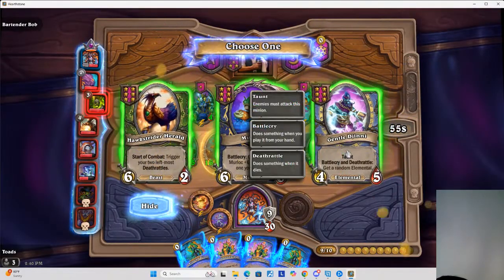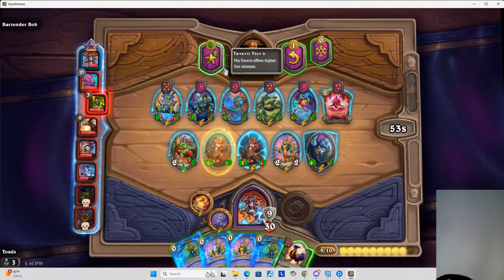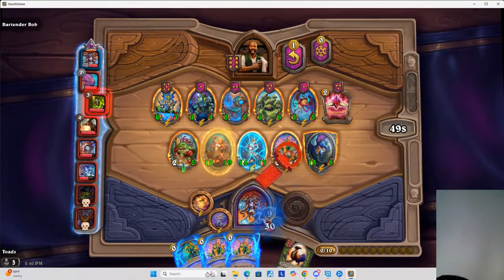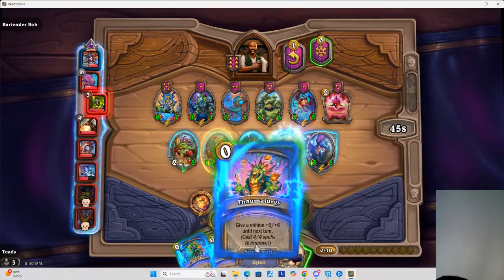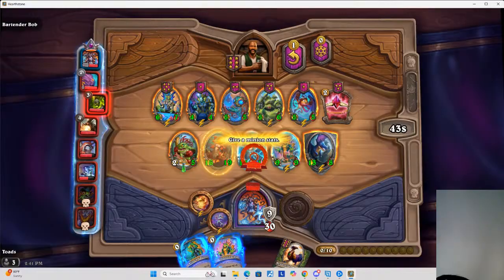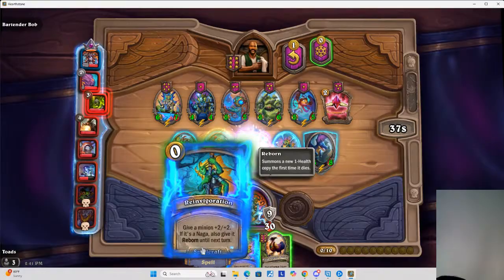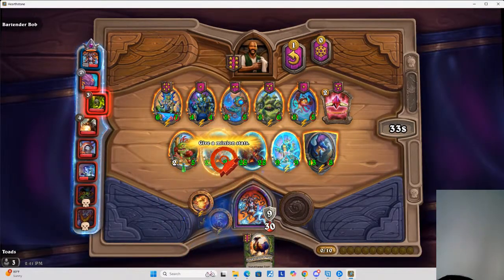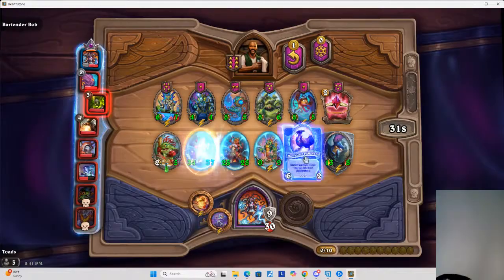Another technique is to ask the other people in the meeting to describe an element in their own words. For the new office space, suppose you describe the furniture installation deliverable as installing new furniture. When Beth describes that deliverable, she says it's installing existing furniture in the new space. That discrepancy could prompt a discussion of getting movers.